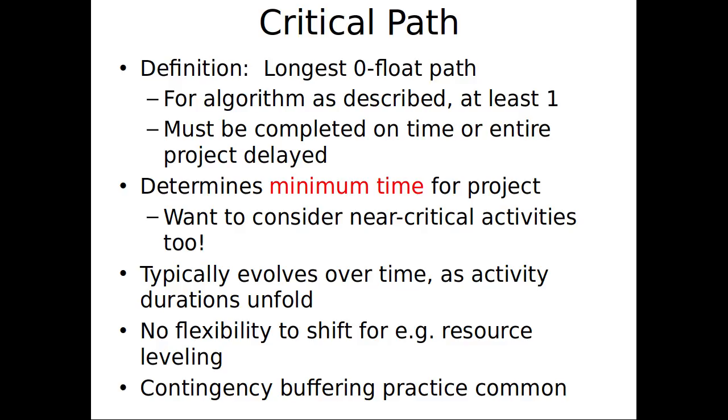So if it took 7 days, it would start at day 9, and could end up finishing then at day 16. This next one would start at day 16, would finish at day 20. It will have delayed the entire project. And now the bottom one is the critical path. It can happen. And the critical path therefore can evolve as durations take longer than expected.